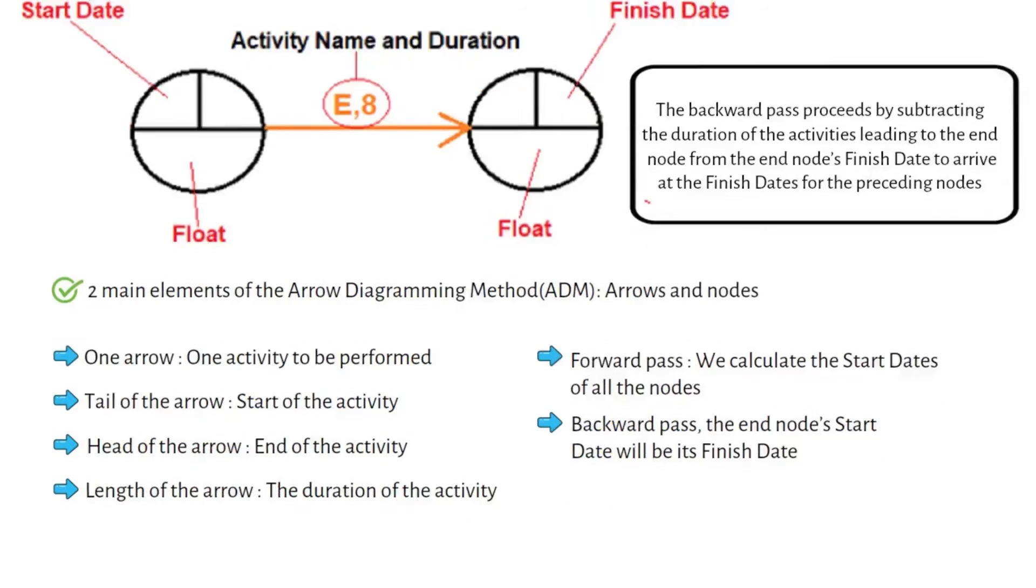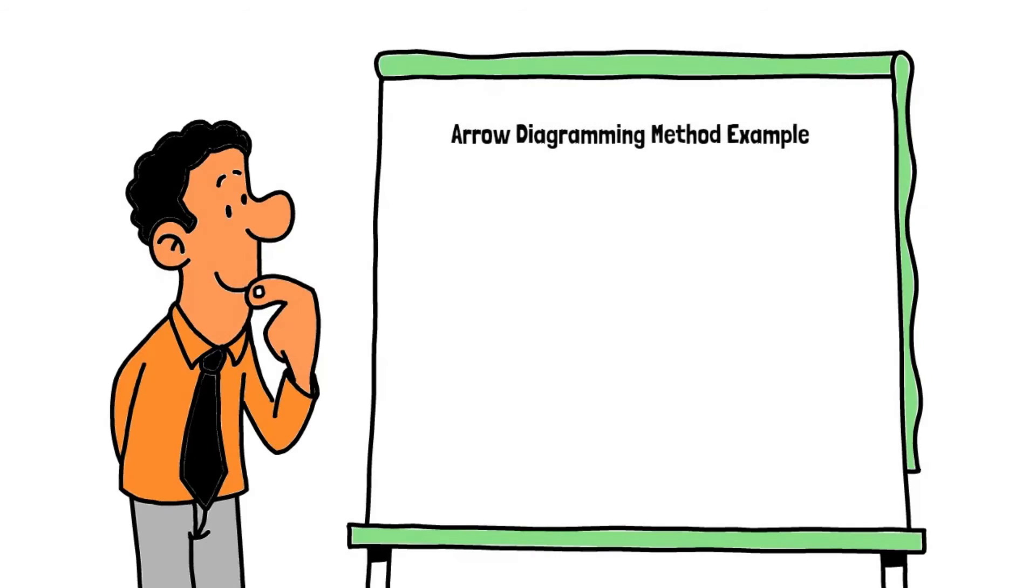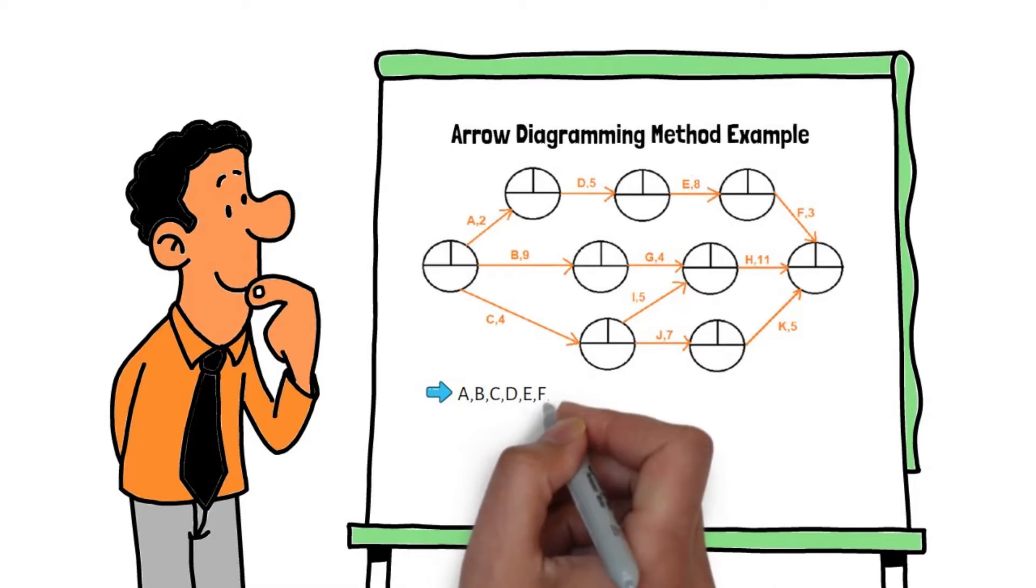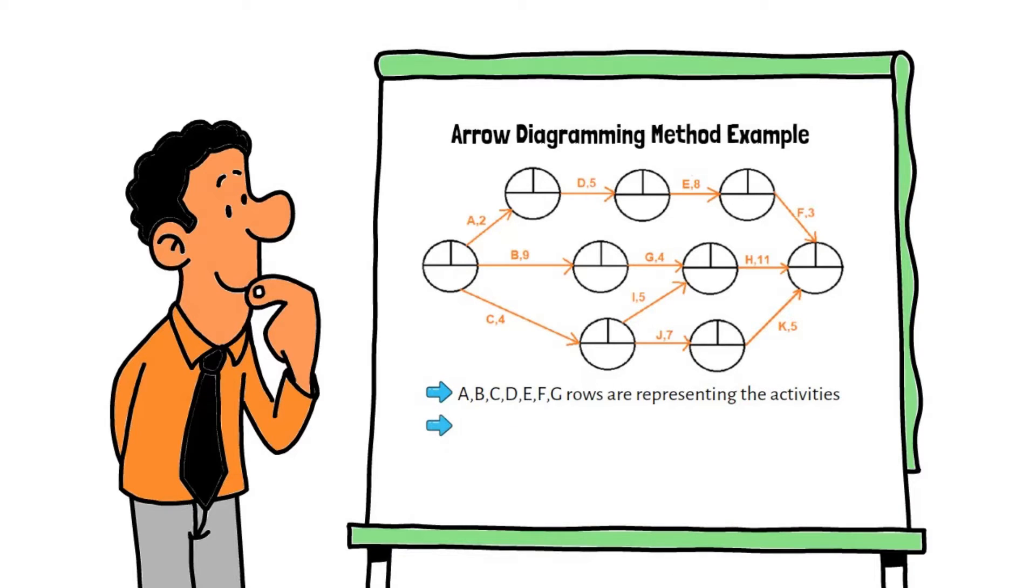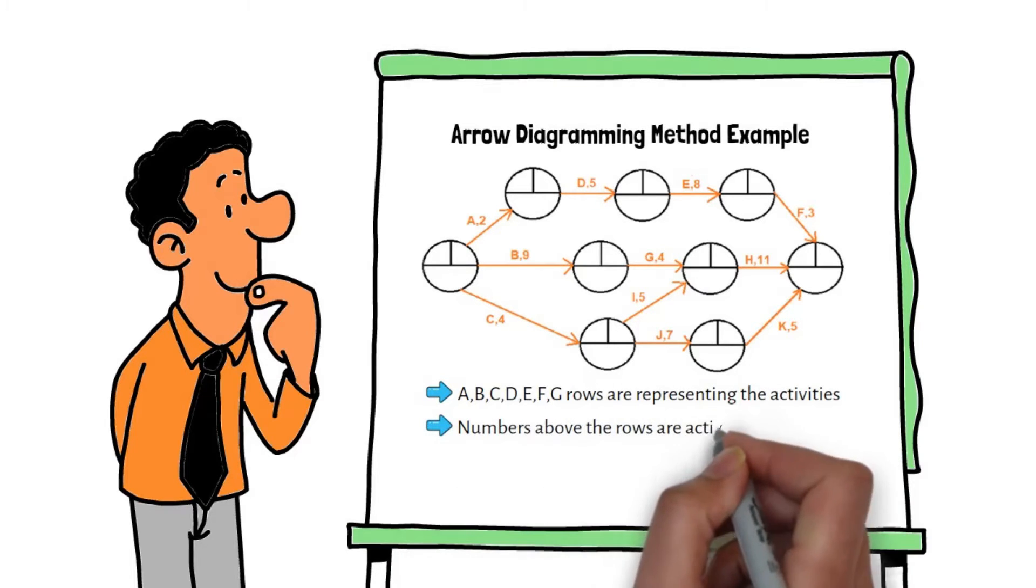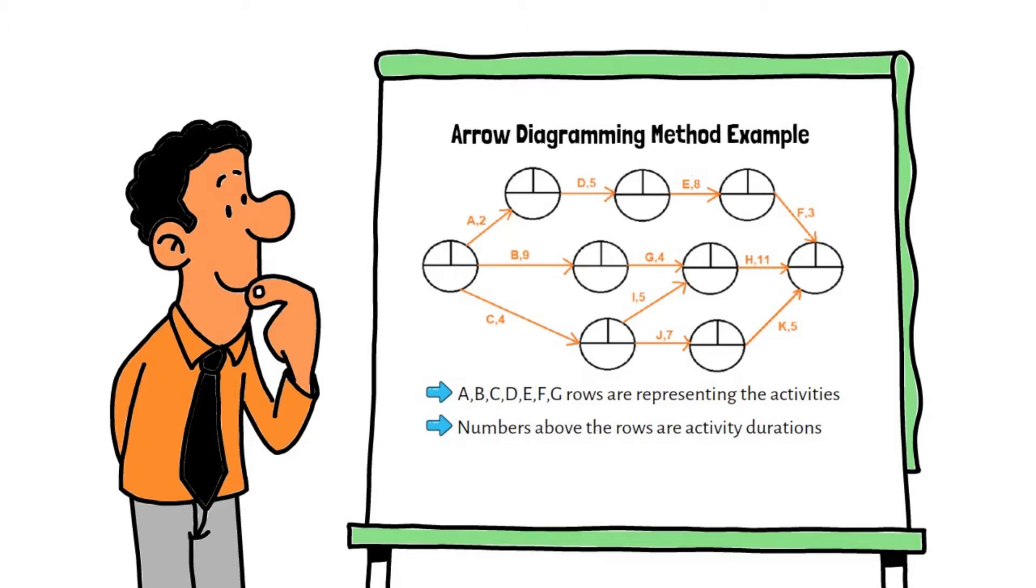Arrow diagramming method example. In this example, A, B, C, D, E, F, G rows are representing the activities. Numbers above the rows are activity durations. As shown in the schema above, in arrow diagramming method only FS relationship is used to link activities.